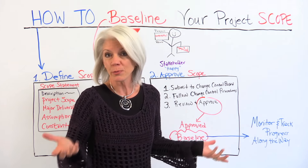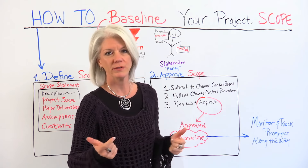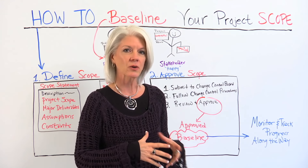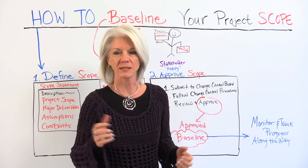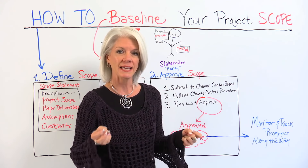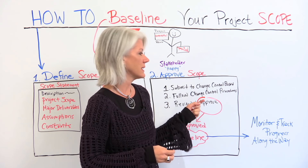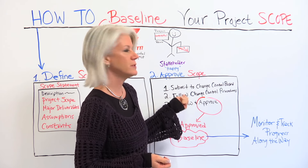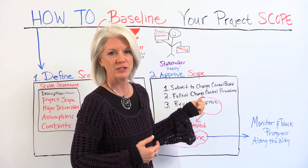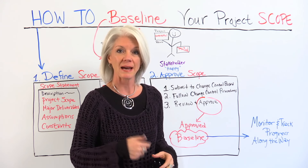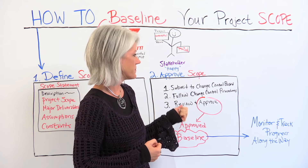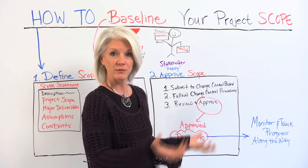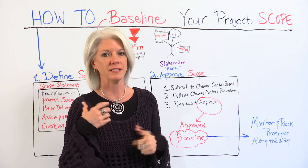How do we approve it and who approves it? The stakeholders approve it — generally one or multiple stakeholders depending on the size of the project. This group is usually called the change control board. The change control board uses the documented change control processes for that project or organization to review the scope.